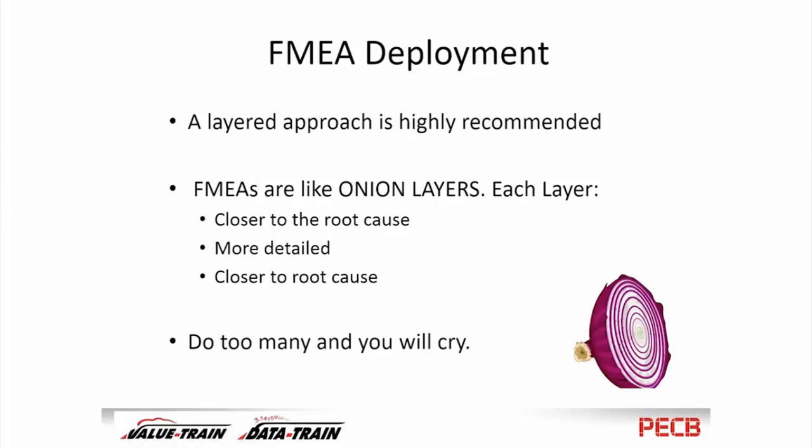And as I describe the details of how we do this, you might be concerned that it could become too complicated or take too much time, and that is a concern that people have. But I like to look at the systems as an onion, where I can start broadly, which is the outer layer of the onion, and take a look at the risks associated with the large chunks of the system, and then bear in and look at each one of those systems and focus on it.